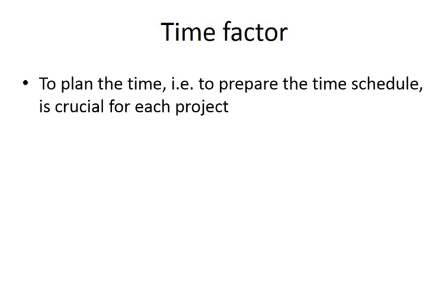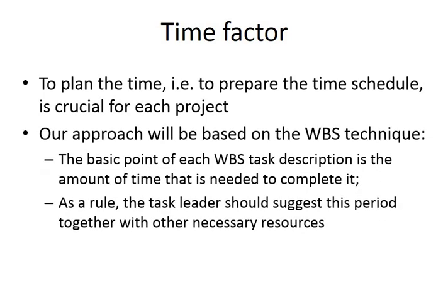So, well, to plan the time of the project is to prepare the schedule, which is crucial. And our approach is totally based on WBS technique. So first you need to have the description of your tasks, and then you try to prepare your schedule. The source of the information about the tasks is basically the manager of the tasks, so the leader of the people that are going to perform the task, but we'll talk about it in a moment.